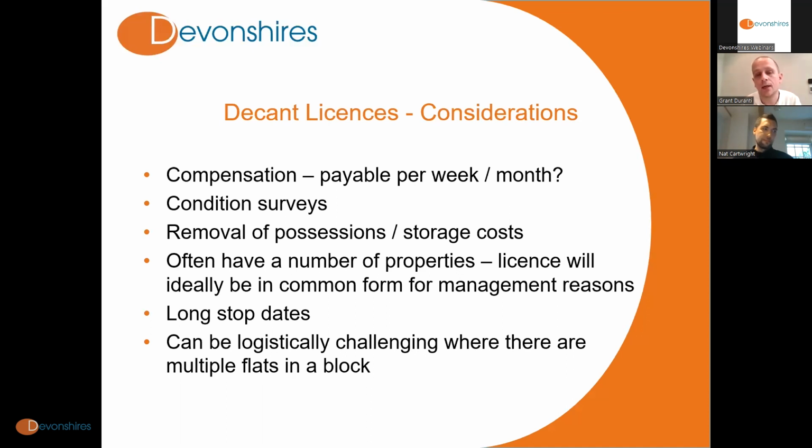Some thought will need to be given to what happens to personal possessions which might be in the flat, and who covers the cost of the storage. Often it will be the landlord, and whether or not that is going to be paid essentially almost reimbursing off of receipts, for example, or whether it is just a flat payment which is allowed for storage costs, and then the tenant essentially takes the risk that if that's not enough, then they'll make up the difference, and if they're able to get it cheaper, then they keep the difference. So that mechanism will need to be thought through and agreed with each tenant.